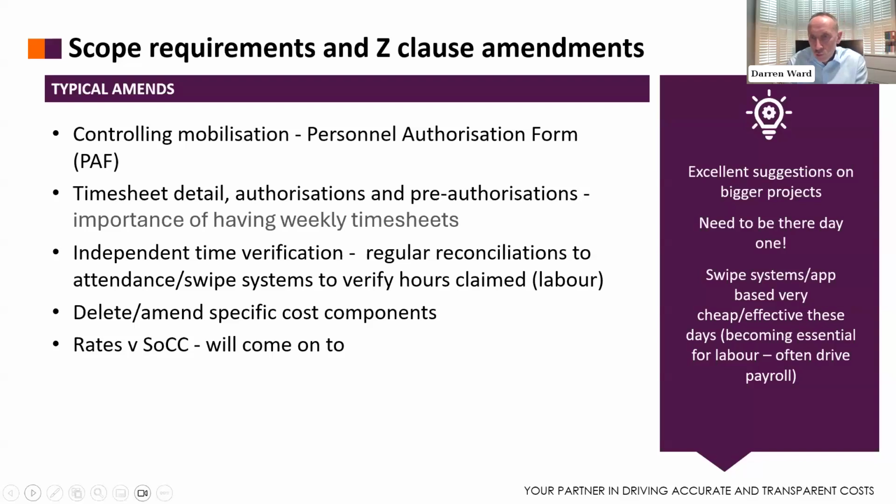Yes, extra rules are needed and they can be great suggestions on bigger projects. However, they do need to be there from day one. And importantly, a lot of these extra systems and checks are becoming relatively cheap and effective. So many organizations I work with now have labor swipe systems that haven't cost a lot of money to install, and they drive directly through to the contractor's payroll.